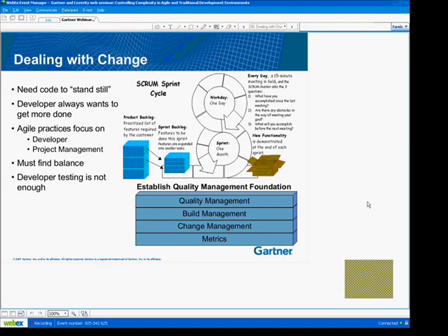So I may say, I was working on a customer lookup query yesterday, and I completed that. And today I'm going to be working on an order modification dialogue. And I'm blocked on, let's say, hooking in the customers to order entry because another team's component isn't on time. So that's going to allow the project manager to know, oh, here are places where maybe I need to go fix this because I can't work on what I'd like to be working on. And I know that every day, taking up just this short little blurb.